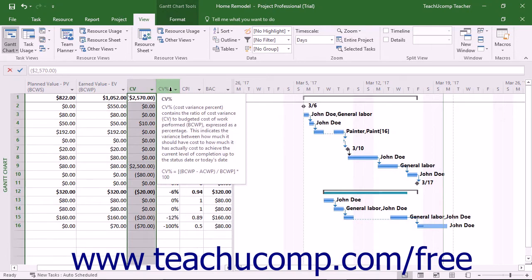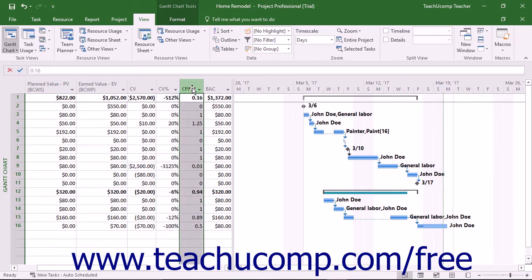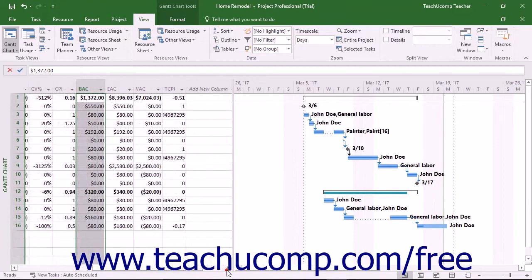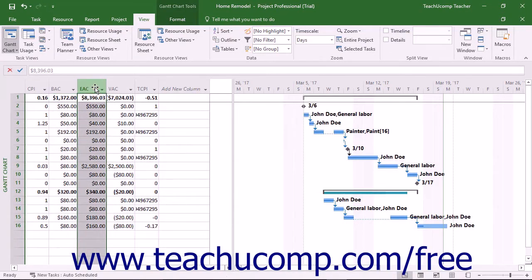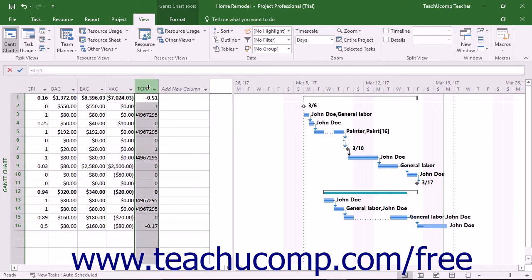You'll see the Cost Variance Percentage, which is the ratio of cost variance to PV expressed as a percentage. You'll also see the Cost Performance Index, which shows how many cents worth of work was accomplished for each dollar's worth of work spent. The Budget at Completion shows the total baseline cost for the task. The Estimate at Completion represents the forecasted cost to complete a task. The Variance at Completion is the difference between the BAC and the EAC. And the To Complete Performance Index shows the ratio of work remaining to the budget remaining as of the status date.